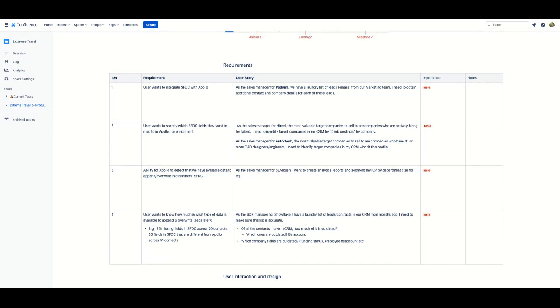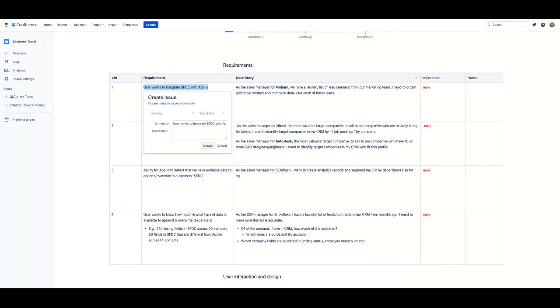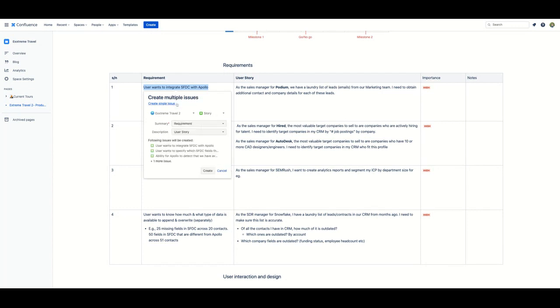To create an issue in Jira, simply highlight the text and select Create Issue in the pop-up. Next, click on Create Multiple Issues from Table. This shortcut feature allows you to add multiple Jira issues all at once, provided the list of issues is contained within a Confluence table.